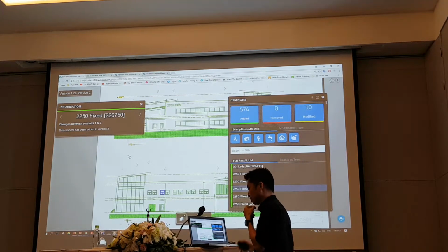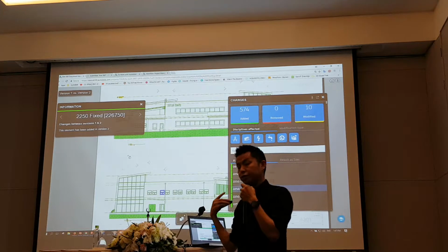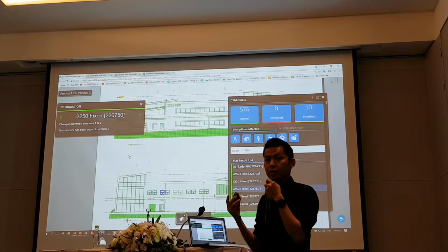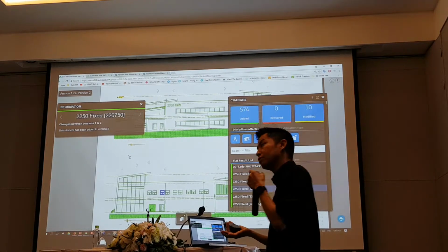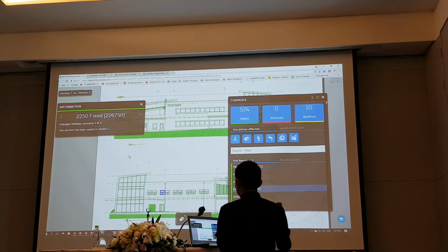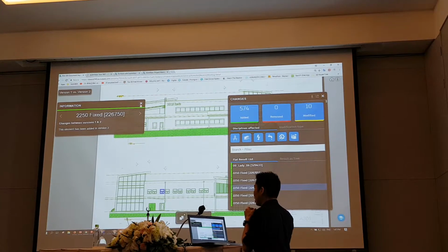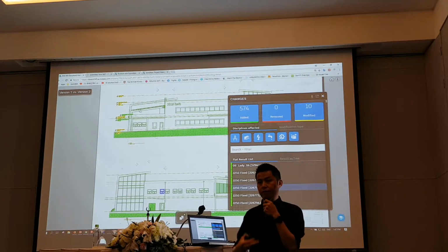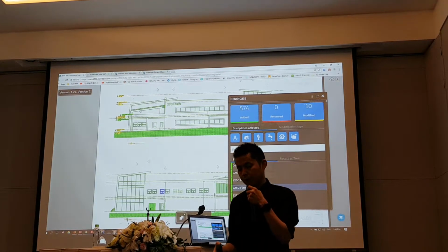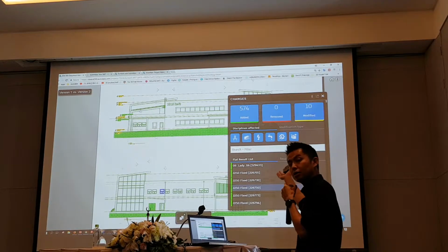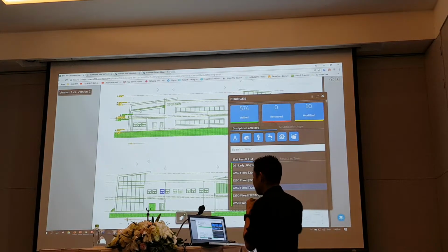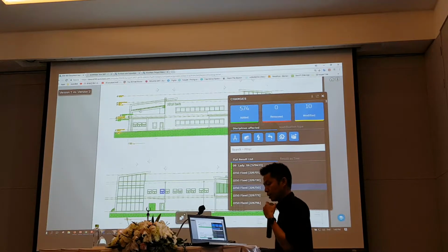The coolest part is that I always show customers in 3D, because in 3D it lets you know the difference in terms of perimeter, area, and volume. It's one of the cool things you can show your customer, and it's very useful. If the engineer or architect makes updates on the version, I go in immediately and know what has changed. And if I'm the QS, I even know what the difference is for the QS.